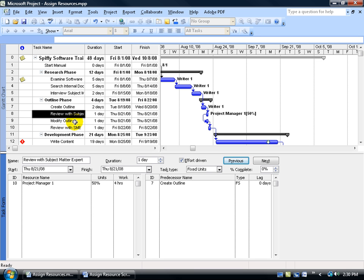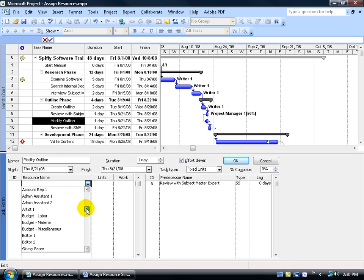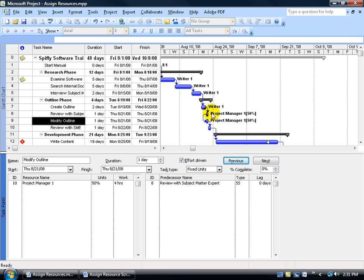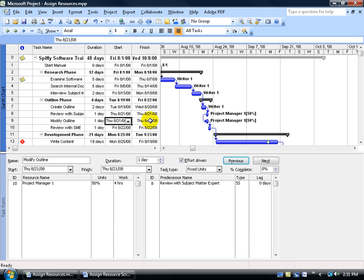So he has an additional 4 hours available where he could work on another task on the same day. And you can see that modified the outline. It's also a start to start relationship over here from its predecessor. So we could go down to that one and also choose the Project Manager to work 50% and click OK. So he's working on two tasks the same day but it's not going to be 8 hours on each task, in which case he'll be over allocated. I mean, who works 16 hours in a day? In any case, it's assuming it's an 8 hour day, so we have 4 hours. 50% of his time is on this task and 50% of his time is on this second task. And like I said, they're the same day, August 21st, August 21st. And they finish both the same day as well.